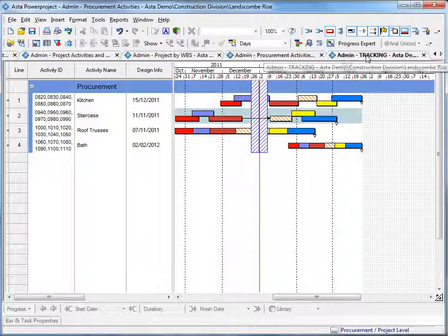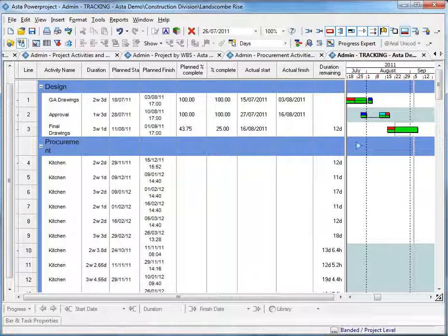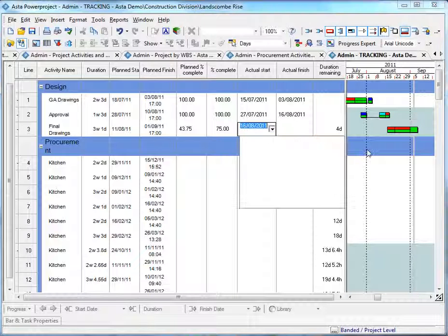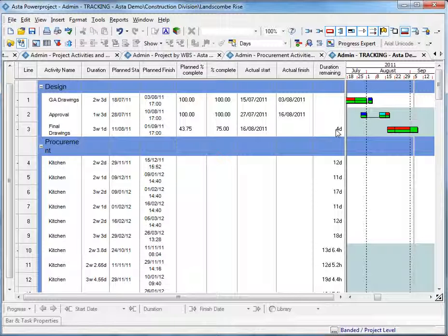And finally, progress. I mentioned to you the as-built program with the colours, and you can see we have a drop line here, and it's very easy for me to put in an amount of progress. So if I wanted to say that was 75% complete, you can see that goes to 75% complete. I can set actual starts and actual finishes, and I can set the remaining duration if I wish to progress up in that fashion. So once we have all that information, obviously we need to have a look at how we can get that out.